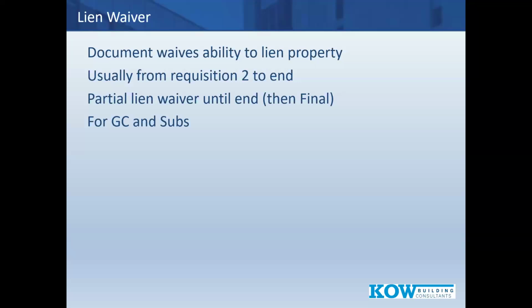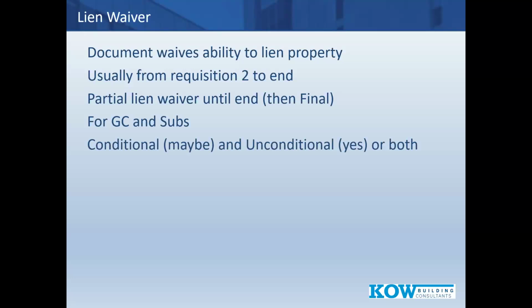I've also seen some banks that will say, no. We want every sub to give us a partial waiver of lien as well. I'm not going to comment on which is better or worse. I'm kind of more leaning towards more paperwork's better just to show that. But I understand legally, if the general contractor says, look, I've been paid $9 million through today, I've paid everyone, here's a partial waiver of lien, that's an argument that I can understand.